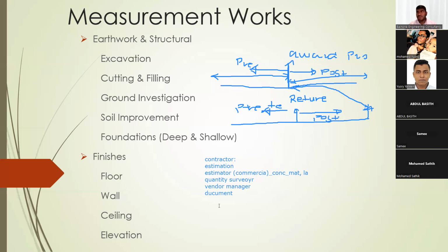After the submission, as I explained earlier, there is a post-tender clarification. During clarification, the consultant asks the contractor estimators for some more detail, or maybe to revise the bill of quantities and unit rates. He will ask questions from time to time until awarding the project. So at that time also you have to work as a quantity surveyor on the bill of quantities, pricing and quantity. So now we see the role of quantity surveyors from the engineer and contractor side till awarding the project.